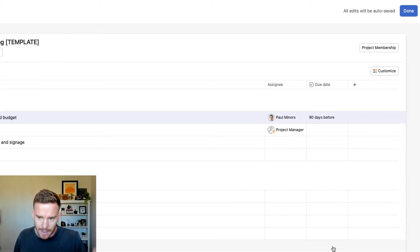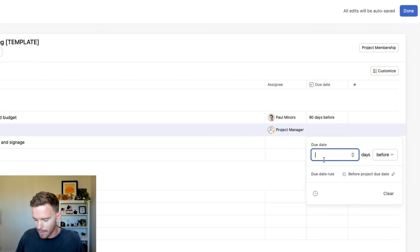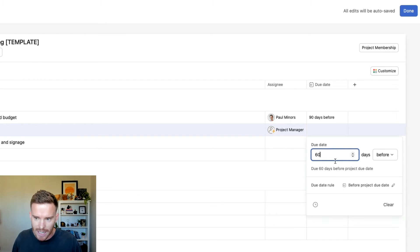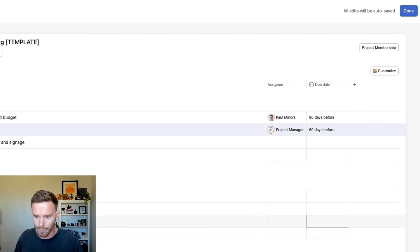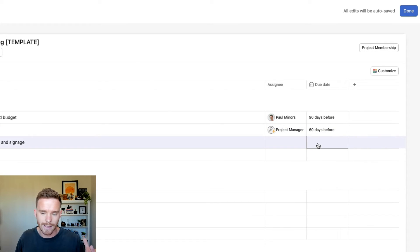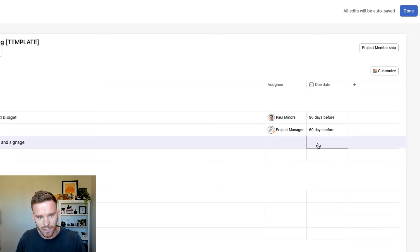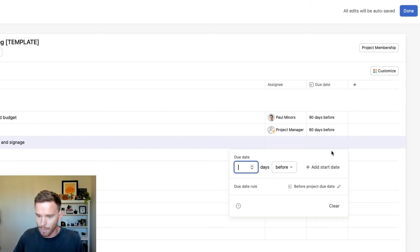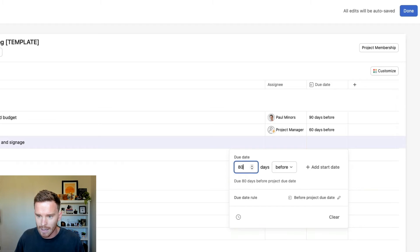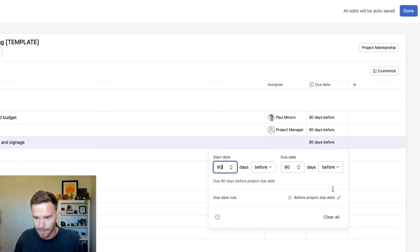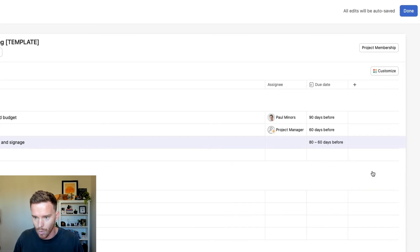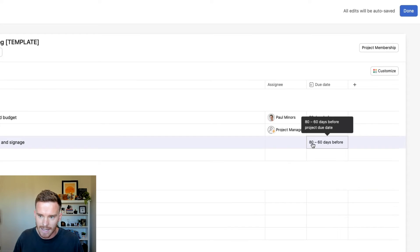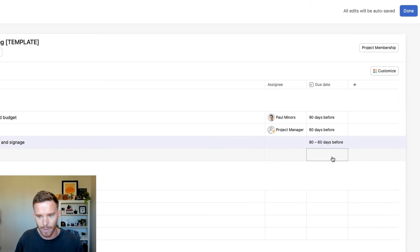I can then continue going through my projects. So maybe booking event space, we need to do that maybe 60 days before the event. So I'm going to say 60 days before the project due date. I can also put date ranges on a task. So design stand layout and signage here, maybe I'm going to do this from day 80 to day, let's say day 80 to day 60. So from days 80 to 60 before the project due date, I'm going to work on that task.